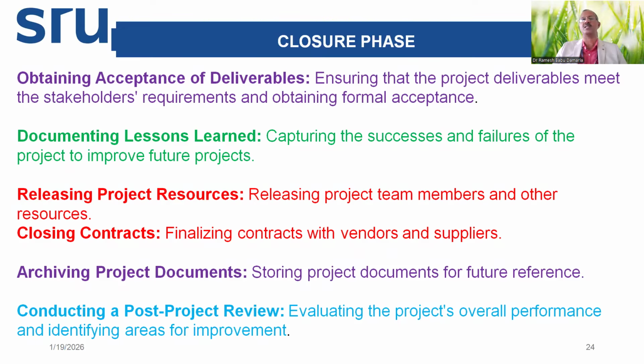Capture all the points which were faced, all the failures, and make a list of the failures and how each was mitigated, how it was faced, how it was addressed, and what was the implication of that. Record all these things so that this will become a useful document for future projects.